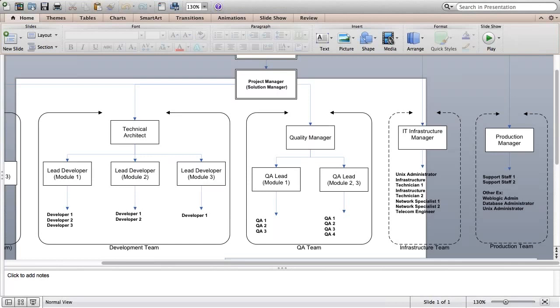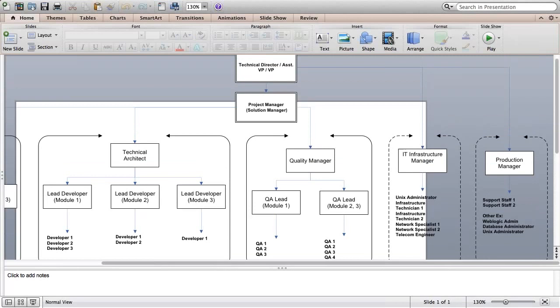If you see these two departments, they don't work for one project in your organization. They work for all the projects within your organization. They are the teams who manage your machines, your software, and any admin rights you require. That's where your infrastructure team comes into the picture, and your production teams handle anything related to production support. Like I said, they don't work for one specific project, but for all the projects within your organization. That's the reason they will never report to the project manager, but always report to someone who is head above or above your PM.